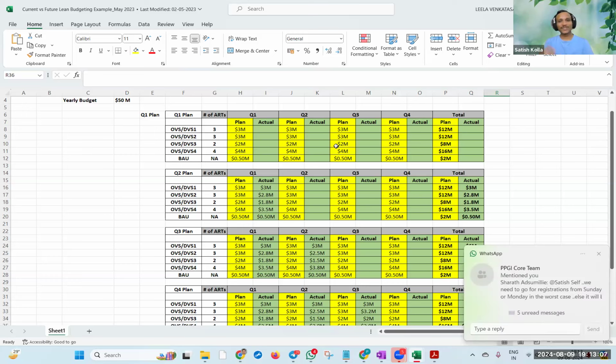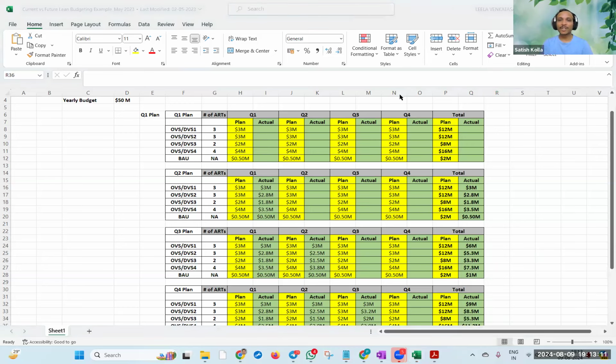Great. So every month, before the beginning, we have to make sure that the budgeting is there. Like at the end of the third week itself, we should start discussing: how are we doing on the budget? What are the budget requirements for the next month? Any changes, any adjustments across the release trains, across the solutions? That's where we are doing the release planning, which includes budgeting as one of the key aspects.